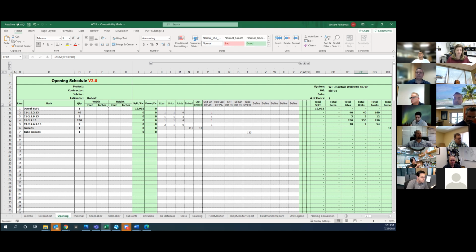So today, in terms of how that would get priced and put onto the forms, those would get listed as subcontractors. And then if we get that job, accounting will go and take that money and pull it out, and they move it over into Interiors. But we list it within the forms as a subcontractor in those estimates for the doors.